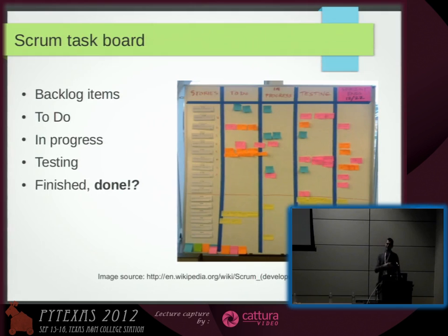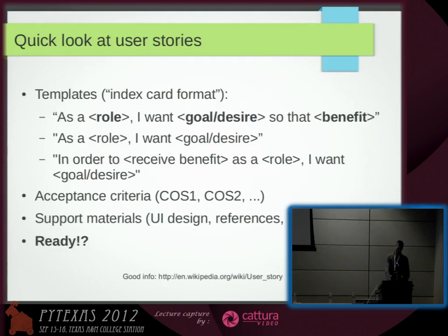But on the other hand, there is a different level for different applications. If you're making a website that's not critical to anybody's health or anything, that may have a different definition of done than if you are doing some embedded development for a life support application. So this is more like an internal policy of the team, what they need to do when they're doing that work. So that a team can self-organize, but also self-judge if one person or another is really following these policies.